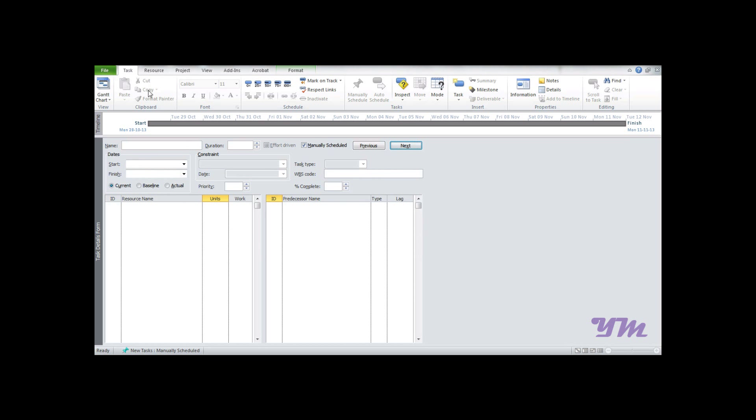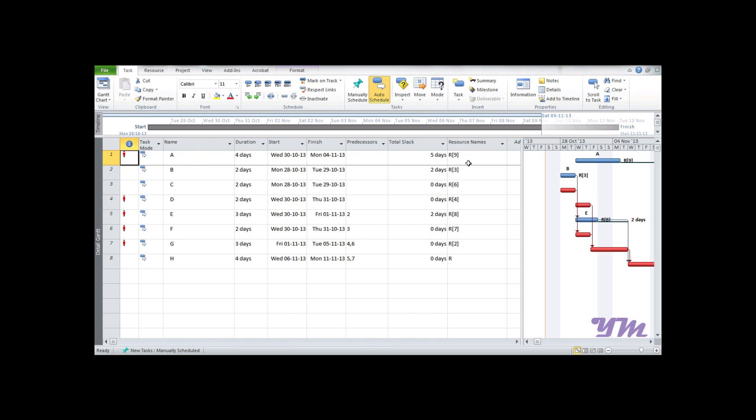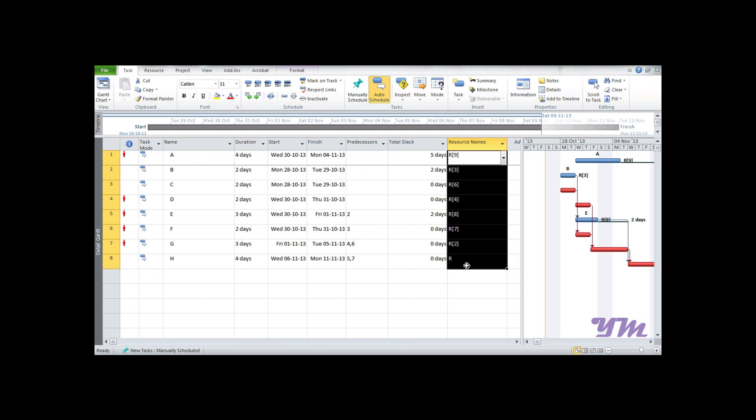Now we're done. We can go back to the Detailed Gantt view and see the resources have been assigned here and displayed on the bars. If they're not displayed, you can go to Format > Bar and select it on the right portion of the bar. This is how to assign resources in Microsoft Project 2010.